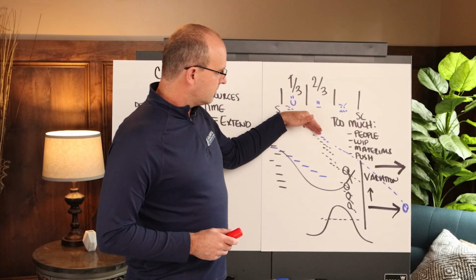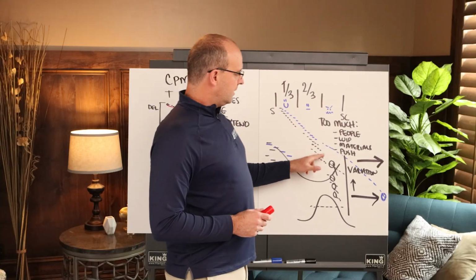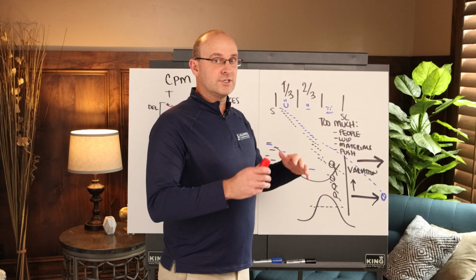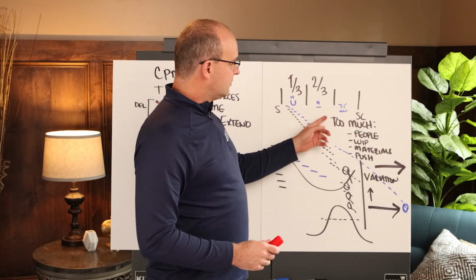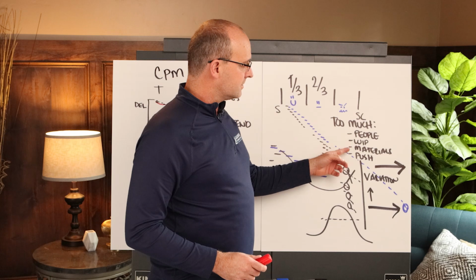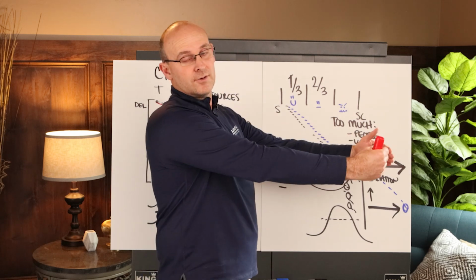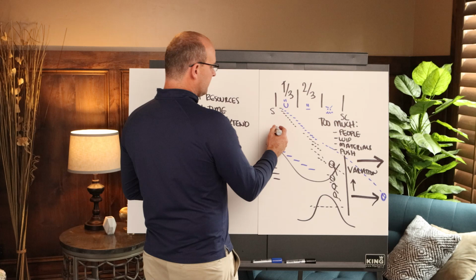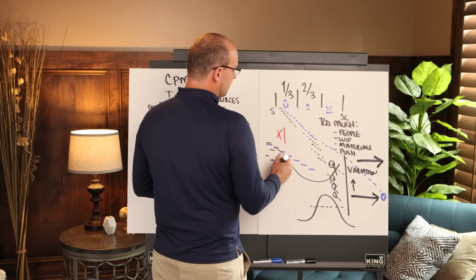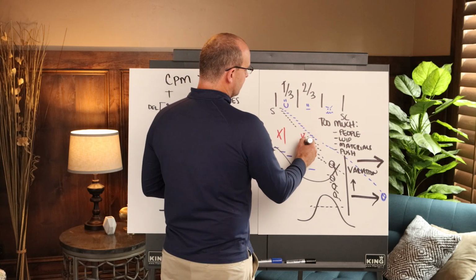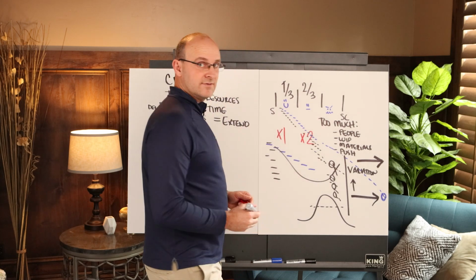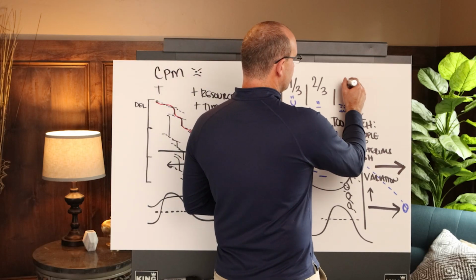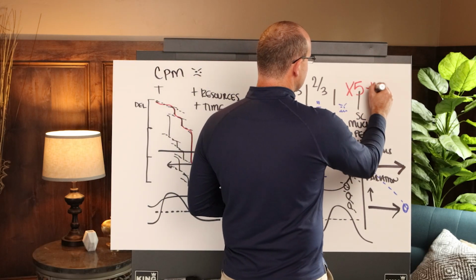You keep trying to rush, which delays you further. Then you start stacking work by dissolving logic, which rushes you even further. And then you have too many people, work in process, and materials pushed in, which extends your schedule because you're losing productivity. So it was a problem times 1 up here. It started to be a problem times 2 because of a compounding effect. Now watch this. At the end, it's going to be like times 5 to 10.